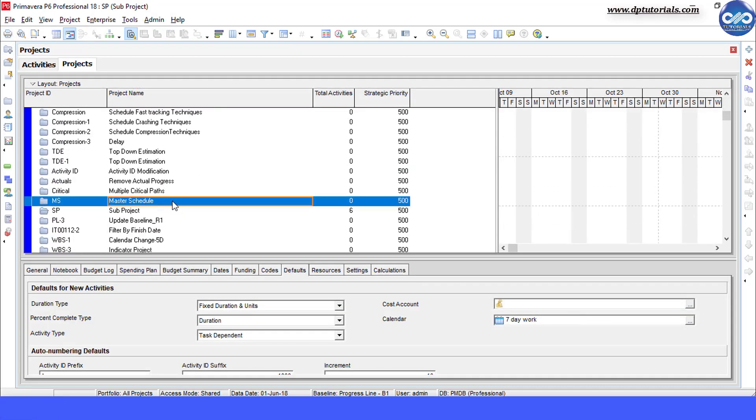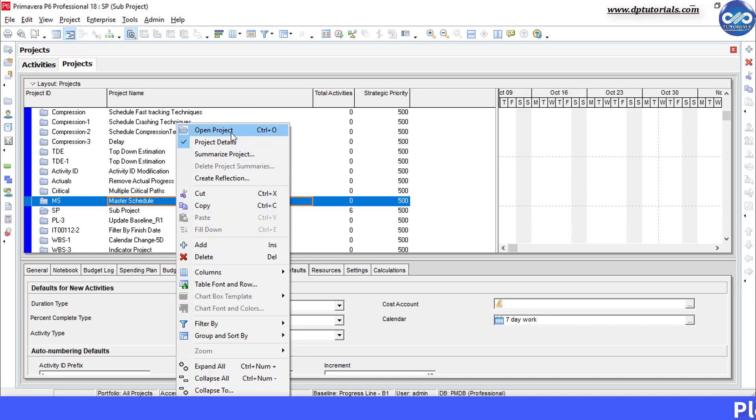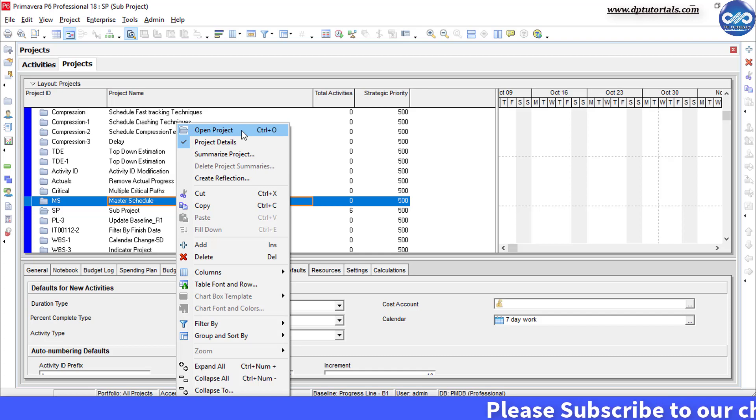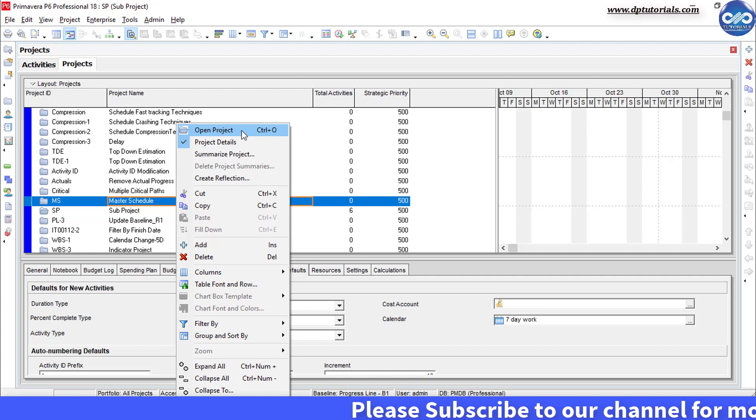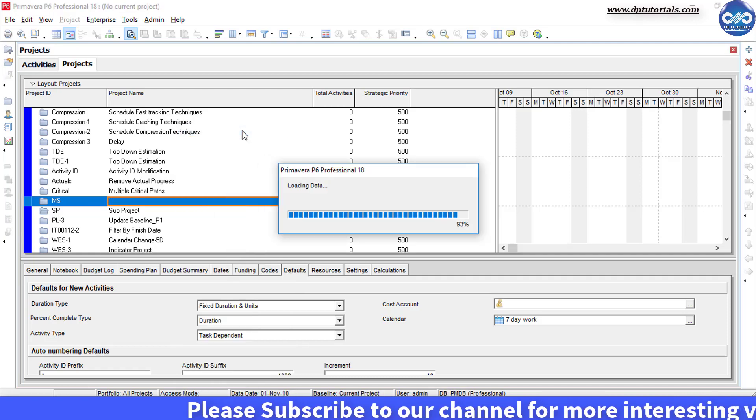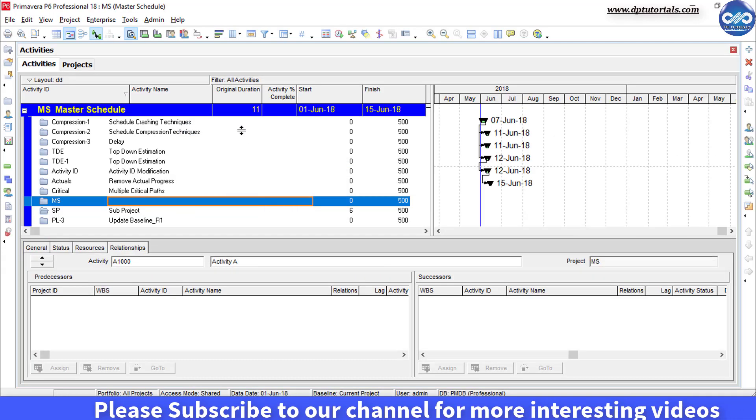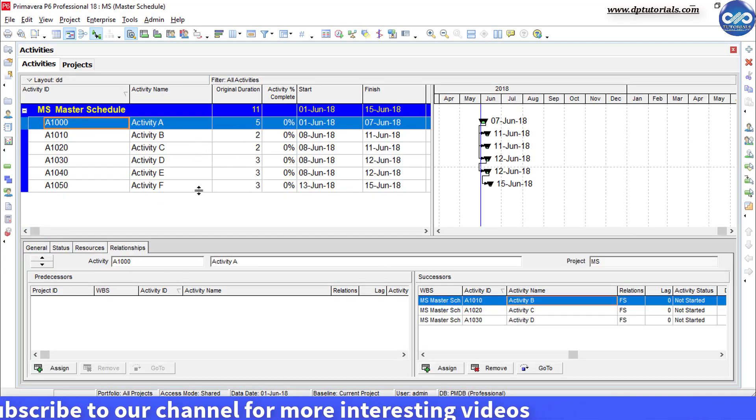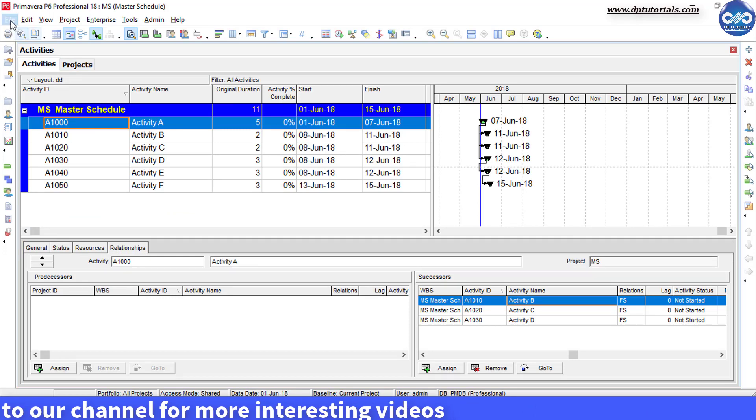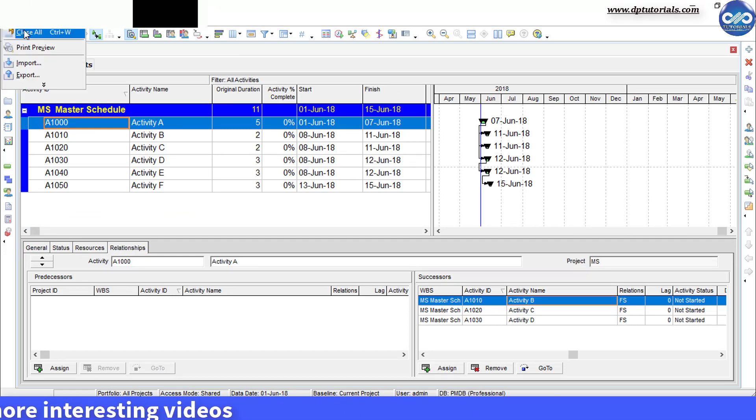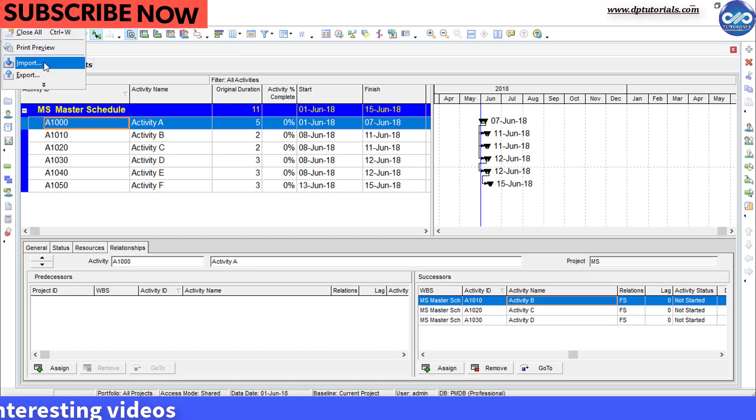As a first step, we need to open the project schedule into which we want to insert the other project as a sub project. So let us open this master schedule here. Once you open the master schedule, go to menu bar and click on import.